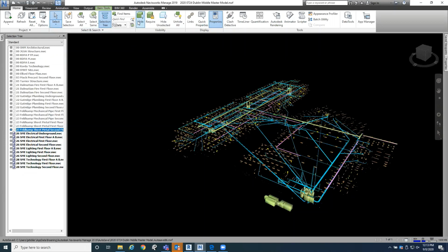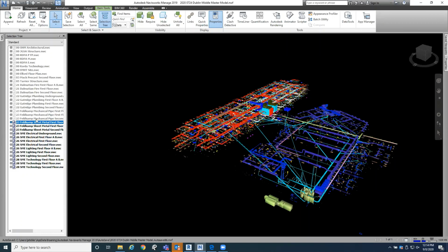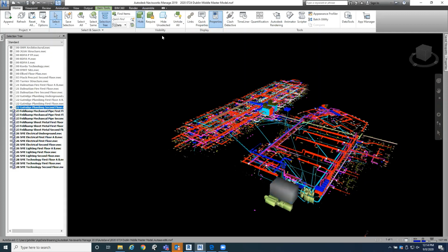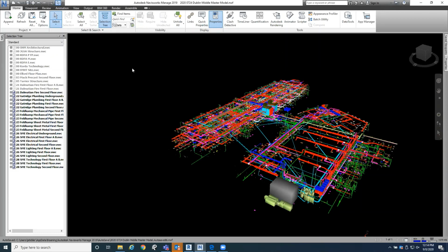The way that I've done it in Revit has been conducive to us just being able to stack one on top of the other the way that we want to do it in Navisworks, because since we're only going to clash detect one section at a time, we need to be able to separate it out, and if we do entire floors, it becomes a challenge to discern what area you're in, or at least for me it does.